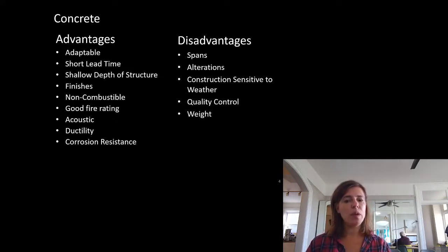Now, that's something we do when we design a new building, where we're designing all the elements, and is weeks of work. These people wanted to put a door in, and it worked by inspection. I wrote a memo, explained that it worked by inspection, and they said they wouldn't accept it. Now, you have to remember, this person who owns the building just wants to put a doorway in. Now, all of a sudden, they had to pay an engineer for weeks worth of work just to say they could put in a door, more than the cost of putting in the door itself.